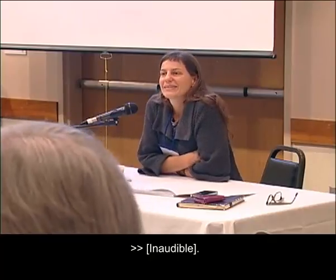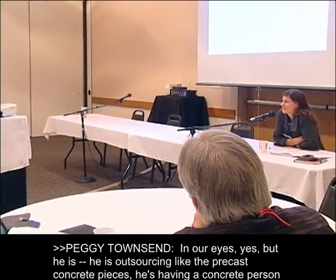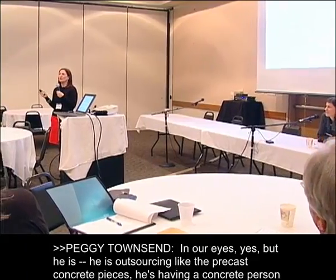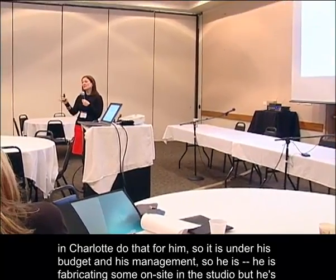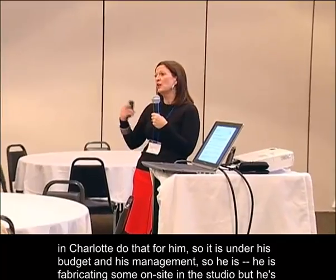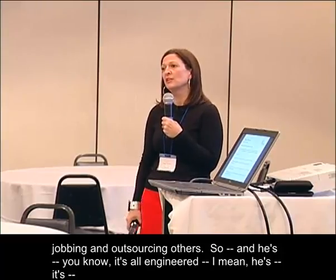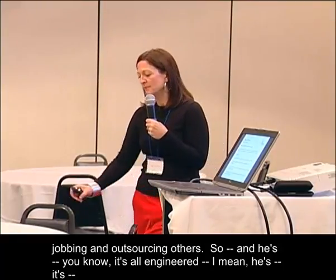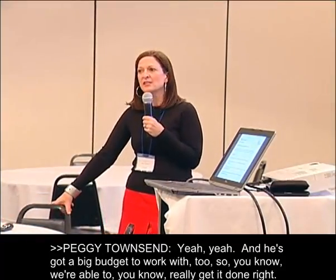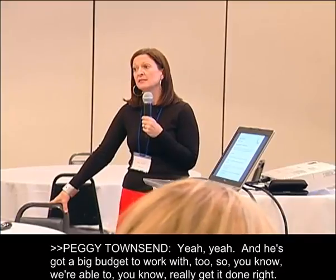Is your artist your fabricator as well? In our eyes, yes. But he is outsourcing the precast concrete pieces. He's having a concrete person in Charlotte do that for him, so it is under his budget and his management. He is fabricating some on site in the studio, but he's jobbing out others. It's all engineered. He's a pro. He's done big projects before, so he knows. And he's got a big budget to work with too, so we're able to really get it done right.